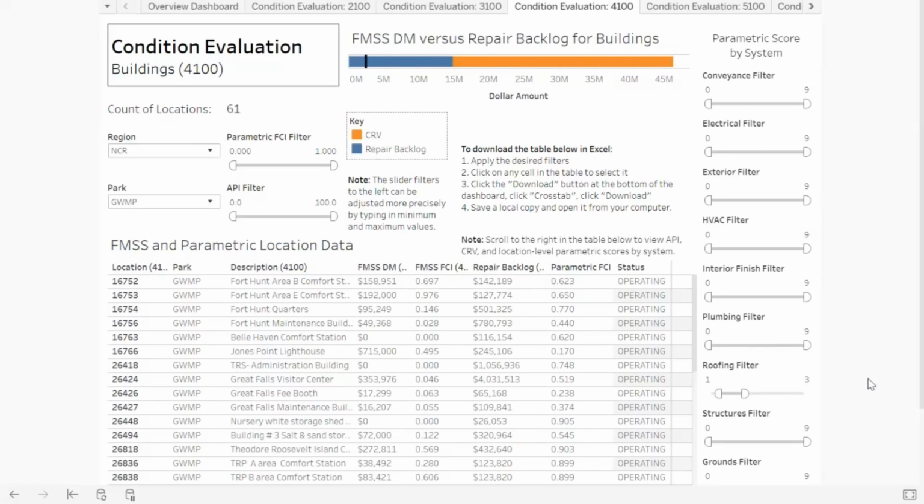Mary. So again, what I stated, that we do update our CRVs annually by the inflationary indices that come from RS Means. You're correct that they don't reflect specific construction materials and types. It's really an average across the board. Now, within the CRV calculator, we actually do have assemblies that are based on specific line items, and as much as possible, they come from RS Means. If we get a new number, it gets updated.